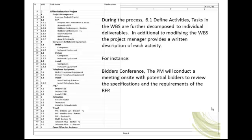During the process 6.1 Define Activities, tasks in the WBS are further decomposed to individual deliverables. In addition to modifying the WBS, the project manager provides a written description of each activity. In our example, we've decomposed RFP. RFP consists of the following tasks and the project manager will define all these tasks. For instance, bidders conference: The PM will conduct a meeting on-site with potential bidders to review the specifications and the requirements of the RFP.